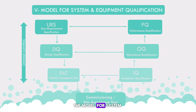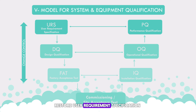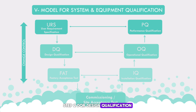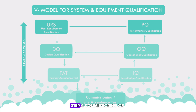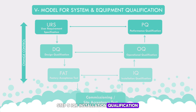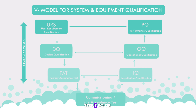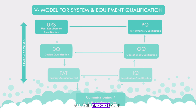The model for system and equipment qualification consists of: Step 1 — URS (User Requirement Specification), Step 2 — DQ (Design Qualification), Step 3 — FAT (Factory Acceptance Test), Step 4 — Commissioning or Site Acceptance Test, Step 5 — IQ (Installation Qualification), Step 6 — OQ (Operational Qualification), Step 7 — PQ (Performance Qualification). All of this process is carried out using change control.